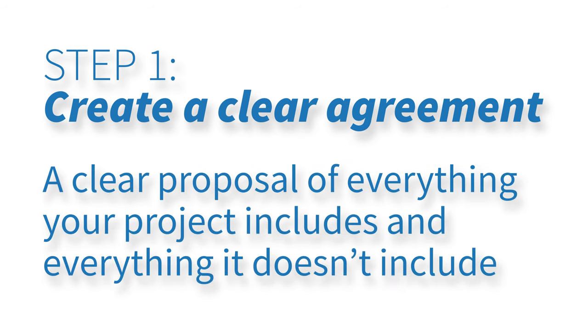Step one: you need to have a crystal clear contract or agreement — a clear proposal. Everything that your project includes and everything it doesn't include needs to be detailed: what you expect from the client and what they should expect from you. Things like how many revisions are included, the turnaround time, how many total revisions, and how many minor versus major revisions, because those are two completely different things. Put together clear terms and conditions so the scope doesn't creep on you, giving you a foundation to go back to and say, 'This is not in the scope of work — I'd be happy to do it but here's an invoice for that.'